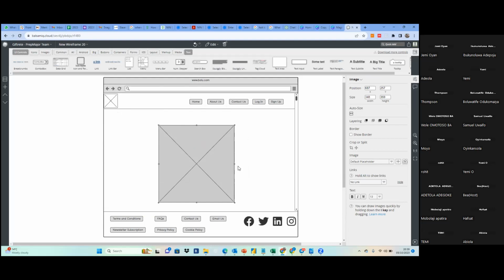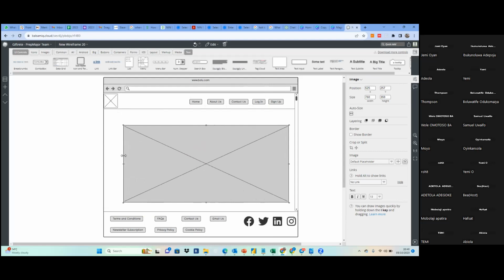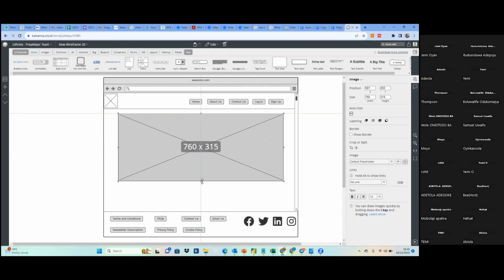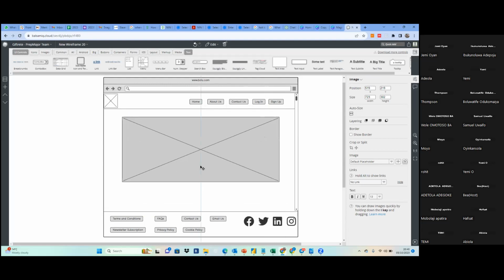One thing is important I want to say, because I've seen this happen over and over again. You guys are not UX UI designers. You don't need color in your wireframe. You don't need wordings in your wireframe. All the wordings should be in your acceptance criteria. Don't write inside, except it is inevitable.